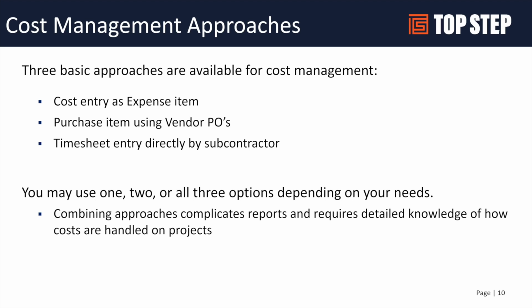We see this really handy when integrating with the backend financial system. For example, if you have NetSuite, we can bring over subcontractor vendor bills from NetSuite into OpenAir and create those as purchase items. And then that would apply your costs. It also allows you to do rebilling back to your customer using purchase billing rules. So that's another strategy depending on your relationship with your contractors.